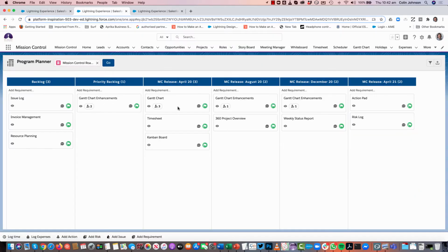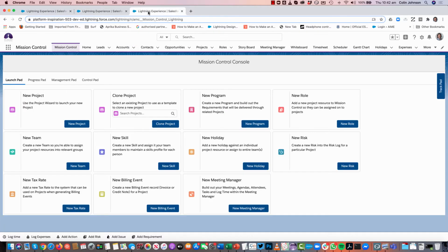So using the storyboard, I can actually reparent some of those user stories. For example, based on everything that I've got to get done within this release, I might not have capacity to deliver all 3 user stories. So I might need to reparent to one of the other subsequent releases. And that's really where the storyboard comes in. So let's jump in and take a look at that.